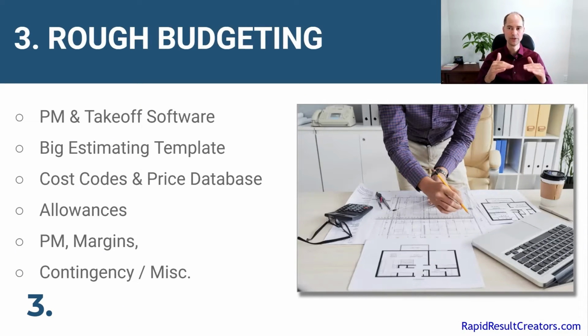Also, you want to be able to smooth it out if maybe something comes up that's a little bit of a gray area, that technically you could do a change order for the client, but it's only like $1,000 here or a couple $100 here, and you've got that missed budget to take care of it without doing a whole bunch of different change orders for the client.